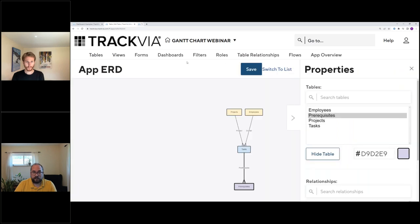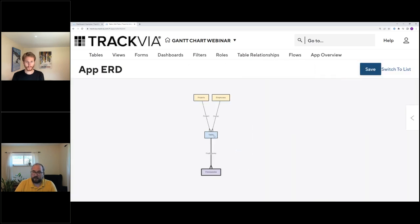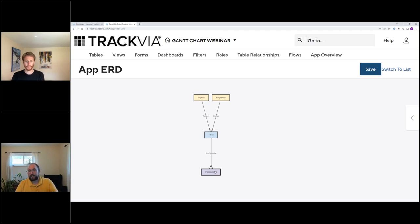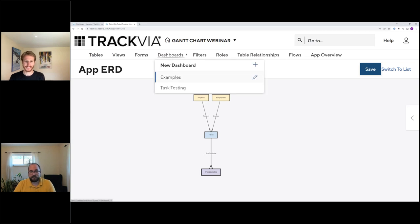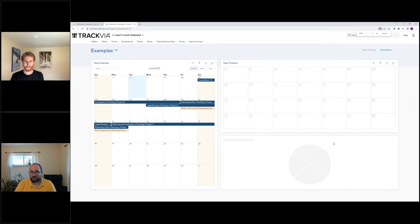To summarize the flow: when someone saves a task record, if the presumed completion triggered field updates, the script runs and stamps that date down into all prerequisite join records. Then the triggered field on the dependent task looks down across the other relationship, finds the max of those clear dates, and uses that to update its own presumed start. Think of it as two overlapping tables: one writes its date down via script, the other reads up via triggered field.